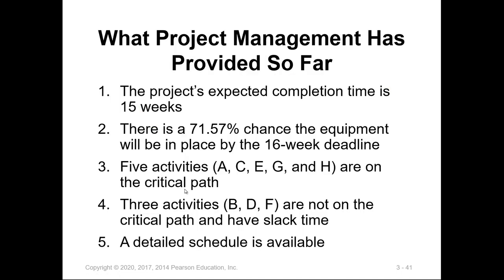With all the critical path method, PERT, probability, and statistical analysis, the project manager can determine the following: the project expected completion time is 15 weeks; there is a 71.57% probability that the project will be completed by the 16th week deadline; five activities — A, C, E, G, and H — are on the critical path; and activities B, D, and F are not on the critical path and have slack time. A detailed schedule is available for management or the client to review.